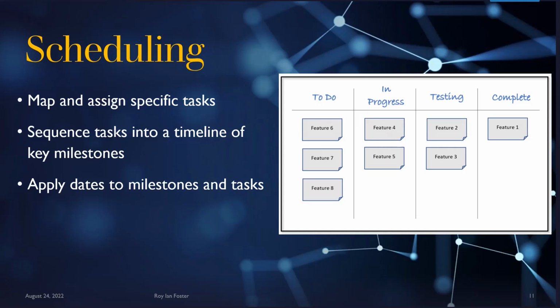And so if we map our specific work tasks into milestones, then we can start scheduling. We can schedule the tasks up into the milestones and the milestones relative to each other. That sort of a thing is what we want to be doing.